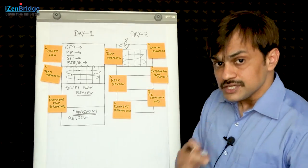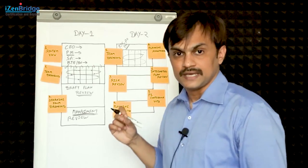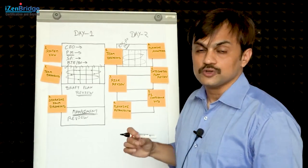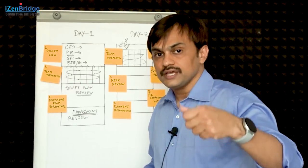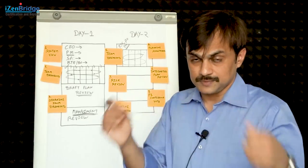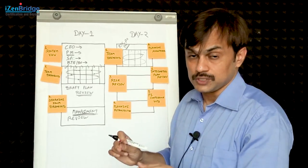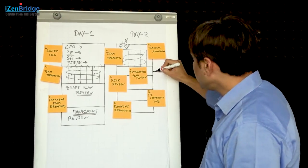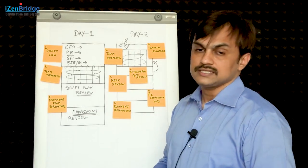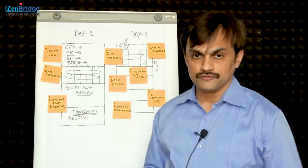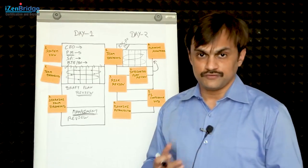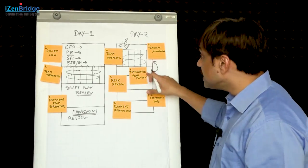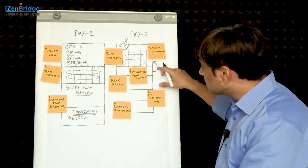Here is again the collaboration happening - we have a plan and we have business stakeholders sitting in the PI planning meeting. Do they see this plan as workable? At the same time, we need to make sure our team sees this plan as achievable. Business feels that their priorities can be achieved by this plan, and the development team feels they can achieve this plan in a given PI. If that is there, we move forward. If not, we need to do problem solving and rework again. If there are gaps, misunderstandings, or something critical not fitting into our PI, we need to explore what we can do differently. We cannot just say this is my priority - figure it out. We need to collaboratively work, and there could be multiple iterations of identifying the problem, adjusting the issue, and then going into a breakout room again.